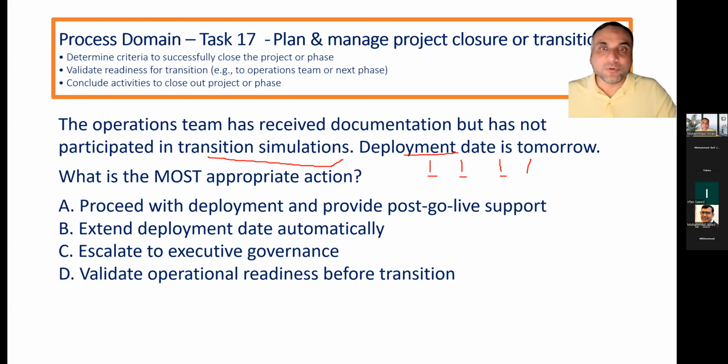So you will change the stakeholder engagement or you will follow the stakeholder engagement. Following the stakeholder engagement means manage stakeholder engagement, which is part of execution, and monitor stakeholder engagement, which means when you are sending and talking to them, you are monitoring them. To monitor stakeholder engagement, there is a tool we discussed during the training. Anyone of you remember? There was a table like this which has their current engagement and desired engagement.